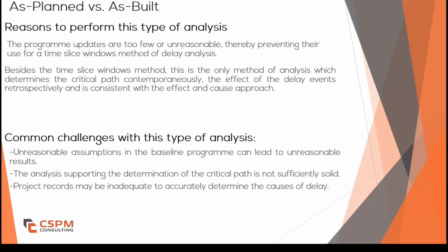Second, when the baseline schedule or critical path is unreliable. Another challenge arises when the original baseline schedule itself is flawed due to unrealistic assumptions or incorrect durations. For example, the baseline schedule might show an excavation activity planned to take 3 days. However, in reality, excavating 200 square meters took 10 days, a much more reasonable time frame. This discrepancy highlights that the planned duration was unrealistic, making a direct schedule comparison ineffective.